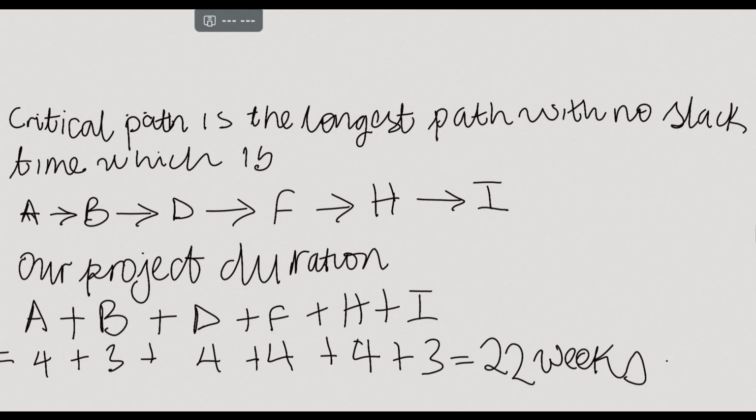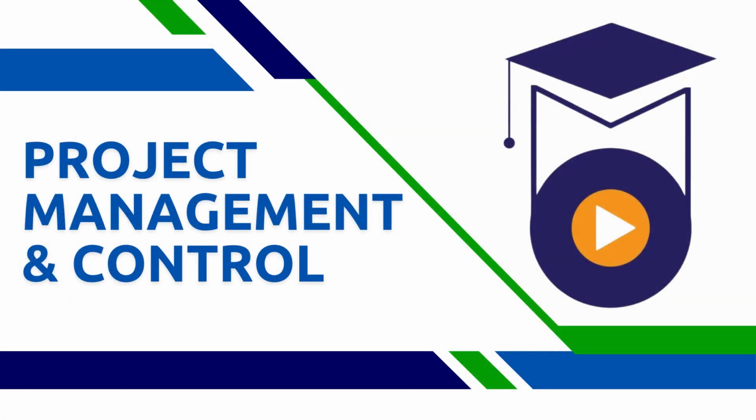The third technique we're going to look at is the Project Evaluation and Review Technique, PERT. PERT analyzes the task by emphasizing the uncertainty and the variability in task duration. That means a task might not always have a standard time, unlike the critical path method where we say it's 4 weeks and it's 4 weeks.